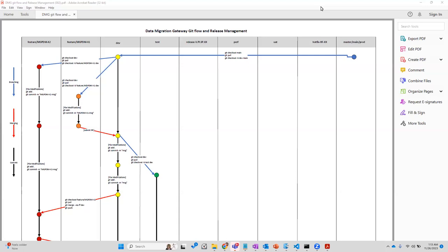It's the agile methodology. You probably don't know, but it's good to understand what the agile methodology of execution for a project is. You will have one Scrum Master and one pod lead, right? He is the technical lead. The pod lead is the technical lead. Then you will have four to five developers, or maybe six developers. So, Scrum Master, pod lead, and let's say six developers, that makes eight people, and two people are QA people who will do the testing, right? So we have this pod structure.